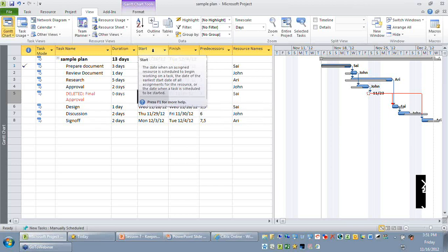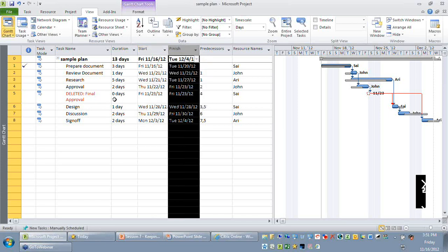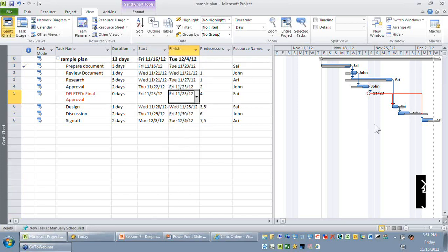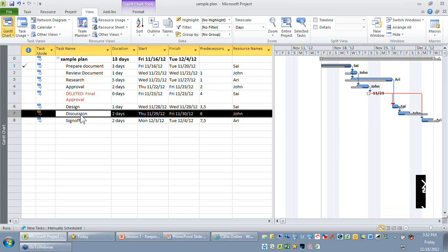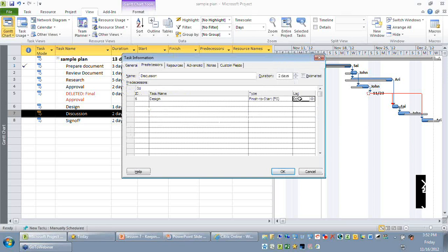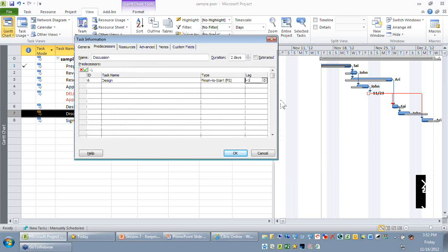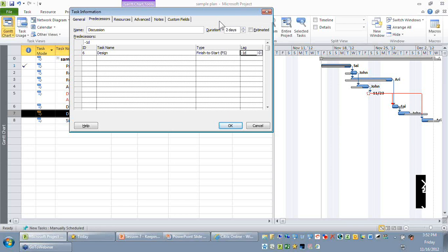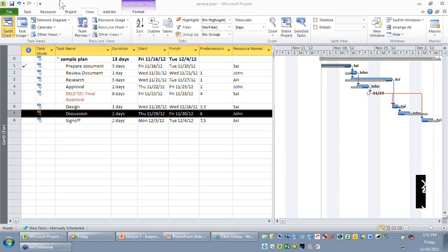When you try to incorporate it, you might find that some activities need to be accelerated or delayed, which needs to be as per your original baseline. If you think the design sign-off should go as per your original baseline, I recommend that between those activities you accelerate by making use of the lag field. You can say this activity should start one day before, because the revised start date and finish date is not something the customer can approve. Maybe you need to do some schedule optimization before you do it.